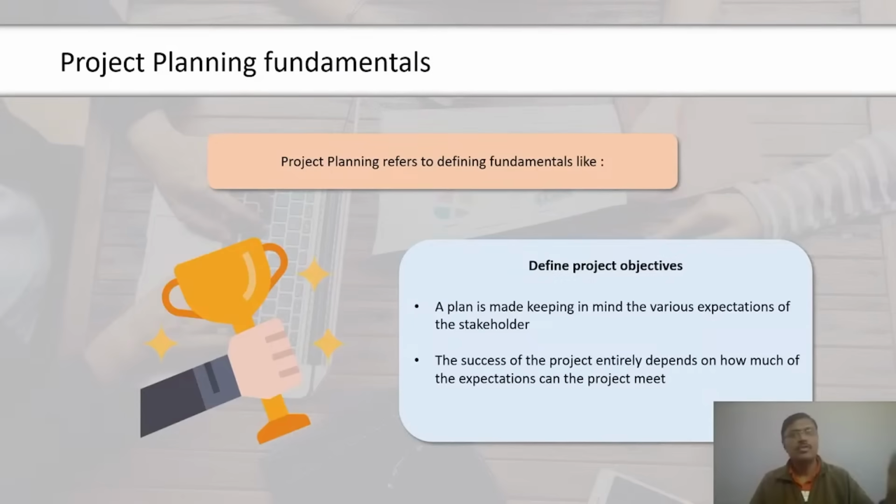In the next screen, let us look at stakeholder management. One of the key responsibilities of a project manager is to manage stakeholders. A project manager has to involve the stakeholders from the beginning of the project until the end, so they are aware of every step. A project manager has to take up specific activities for stakeholder management, identifying both internal and external stakeholders. Missing out any stakeholder can be disastrous for a project. A stakeholder who is identified toward the end of the project may come up with his own requirement at that stage, and incorporating them can be risky.